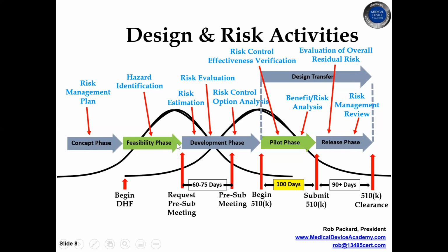During this phase, you're determining what your design inputs are. These are all the testing requirements that you're going to have to pass during verification in the pilot phase. This is also where you identify all your hazards. Under the new CE marking requirements, that's one of the requirements, is you have a documented hazard identification document. Well, a lot of companies don't have that or create that at the end when it should be really an input into your design process.